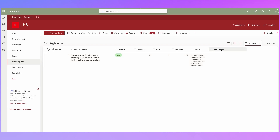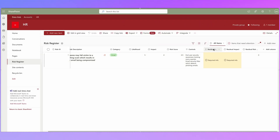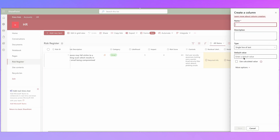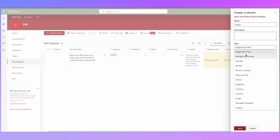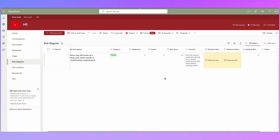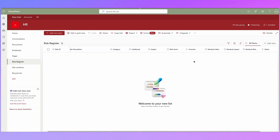I'm now going to add Residual Likelihood, Residual Impact, and a Final Risk Score column, configured exactly the same way as the original three. Finally, I'll add a Notes column for progress or action plans — multiple lines of text, not required. Click Save. To delete an item from the list you can click on it and then click Delete. Once we've configured the conditional formatting we'll put in some test risks.